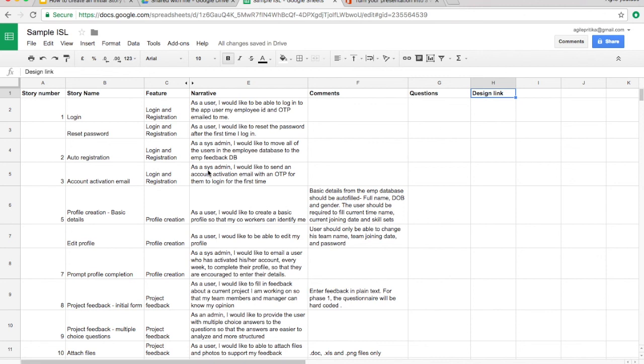In the next part of this video series, I'll be talking about how you'll be using this story list to create a release plan and to prioritize and to get estimates from the rest of your team. So basically, once you've prioritized all of the stories in the story list with your client, you would get estimates from your developer on how much time the user stories would approximately take.